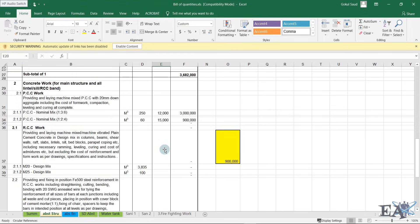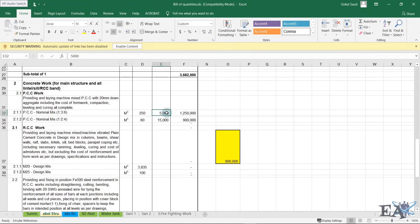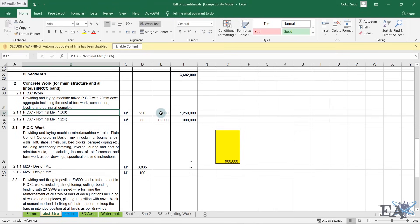Another bad effect of awarding contracts to the lowest-price contractor is quality compromise. For example, a 1:3:6 PCC mix normally costs 12,000 rupees per m³ and can go as low as 10,000–11,000 competitively. But if a contractor proposes 5,000 rupees, you can imagine the quality. To make a profit at that rate, the contractor will mix a lower percentage of cement and higher percentage of sand and aggregate, or use low quality materials, resulting in poor quality output. This is heavily seen in government projects.